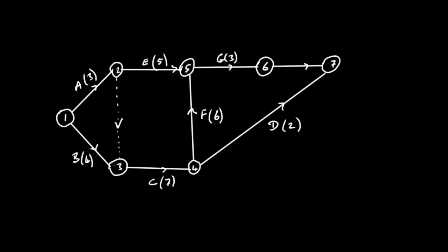Okay, so there's my D, and this one here was H. This was H, and that had duration 4. And now I've got to do my I. So let's go to I here. This is going to be number 8. This is activity I, which has duration 6 days. So now we've gotten rid of the second dummy activity, and we can see that I here now depends on H and D.